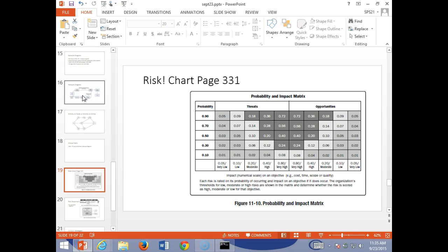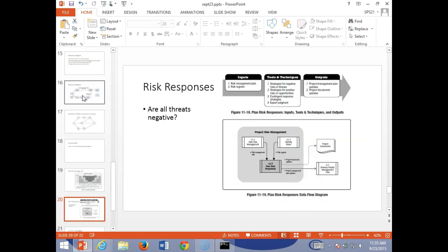So we need some way to start looking at that risk and how we deal with it. Our original work breakdown, we had all the pieces out here, and we said that project is going to take 100 days. If I really start looking at that risk, and I think we're going to have a lot of risk from rain and other external events, is that 100 days realistic anymore? No. And so we need some ways that we can work around and try to find some of them. So we have some risk responses that we're going to look at.